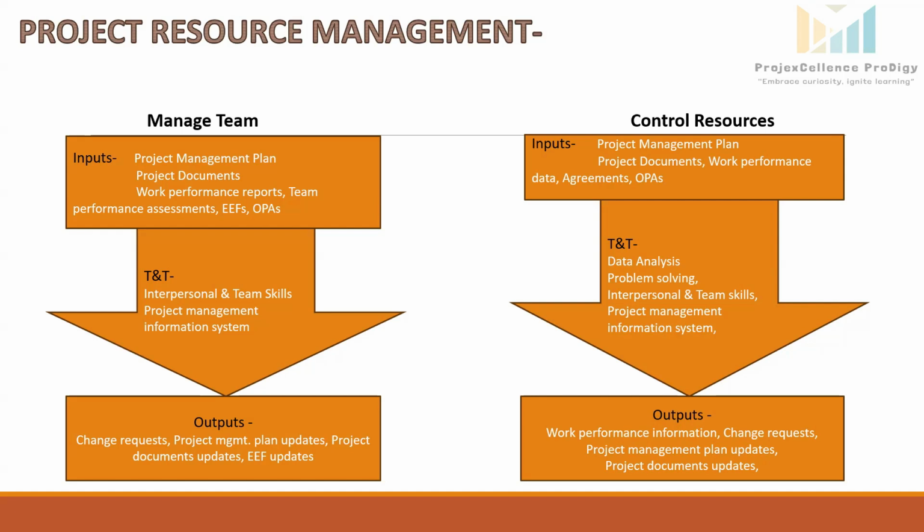Another tool is problem solving. Problem solving techniques identify and resolve issues which affect resource availability or performance. And how does it work? First step, identify the problem. Second, define the problem, break it into smaller manageable problems. Third step is investigation, collect the data. Fourth step is to analyze the data, find the root cause of the problem. Fifth step is solving. Choose the suitable solution from a variety of available ones. And the final step is checking the solution. We have to determine if the problem has been fixed.